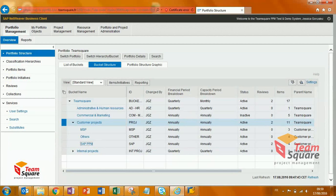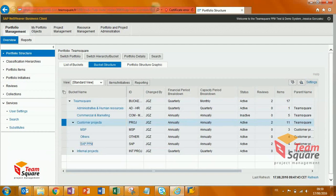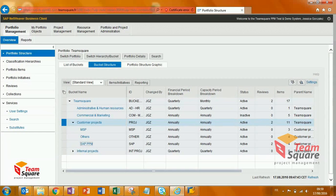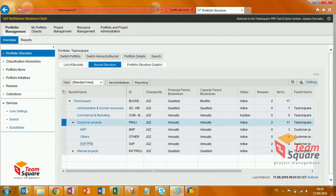In standard, this is a long and painful process since the allocated budget should be filled in bucket by bucket. It means that you have to open the bucket, then the financial planning, enter the budget figures, save, close, and repeat.